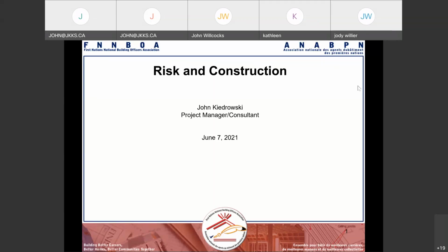Yes. And in terms of the risk in construction, many of the communities do not do a holdback, and they can do a holdback of up to a year to ensure those homes are warranted. Very few communities do that, because off reserve, you can get a home warranty program. So it's a brand new home, the contractor is part of it, and the homeowner has some type of warranty. But in First Nations, that's not the case.